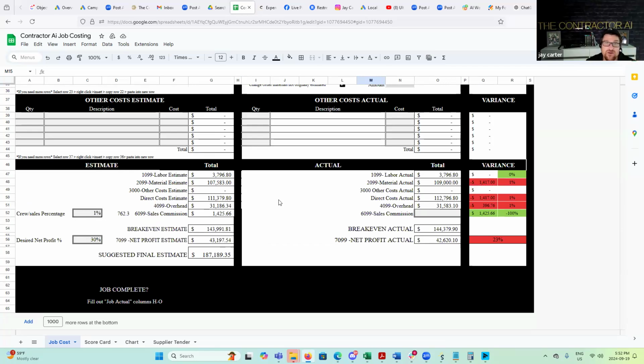You need to have your change order. If you're not at a digital point yet, you're getting those signed. Get them signed immediately while the opportunity is there. If you need a day to do this, these are Excel sheets. You can very quickly calculate a change work order, but speed is the name of the game. Do not leave your change work orders till the end of the job because you will have excuses, like I didn't have time. You will never ever get paid for your services, so get them signed, get them agreed to.